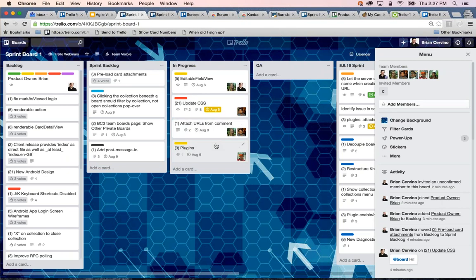Also, as I just mentioned, product owners should balance the workload of a sprint based on the amount of points for each card. And this will become easier once a team has a few sprints under their belt, so don't get discouraged. A better sense of the number of points that can typically be completed in a sprint by your team will develop.